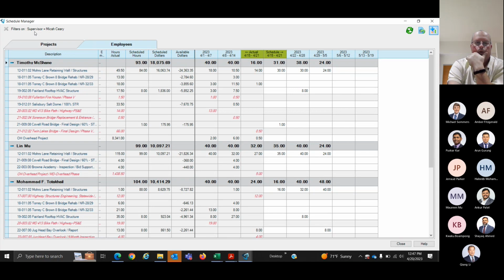Well, and when you have a lot of different jobs and conflicting deadlines, if you keep this dedicated, Steve and Tim know I'll be worried about something before anyone knows there's anything to be worried about, because I projected this out and all of a sudden I've got people running 50 hours a week. Well, at 4 weeks in advance, I can do something about that. If that's next week, I can't do anything about it.